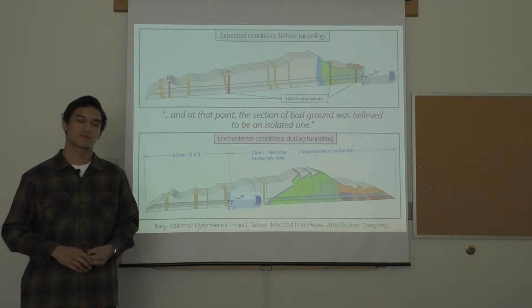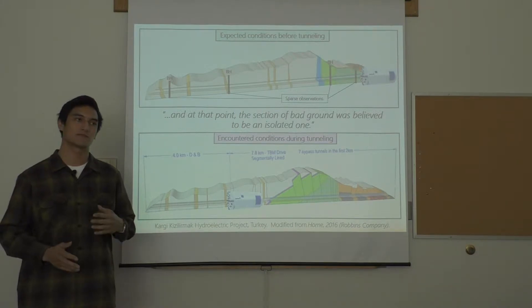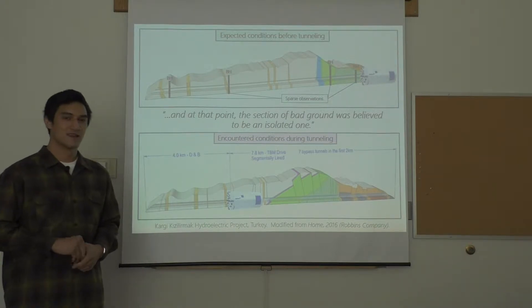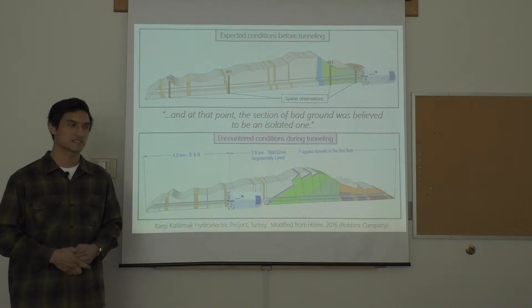Tunneling projects differ from typical construction projects in that their extreme depth and lateral extent mean that there will be a high degree of uncertainty associated with any predictions of geologic structures made from sparse initial investigations. This uncertainty leads to a common problem causing cost and schedule overruns in tunneling projects, which is encountering unexpected ground conditions.